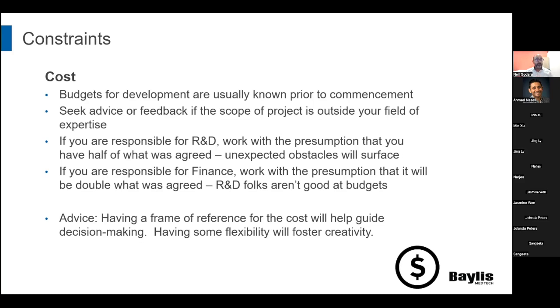Like if you're going to get a lot of bespoke components and everything's got a 12-month lead time, and you have to serialize it for some reason, well, you're never going to get it done. And you're going to have to go back to the team and say, you need to figure out a different way to solve this problem because we have this constraint in the field that needs to be accounted for, and we just can't eat that 8-9 month delay in the project. So you're right, and when I say R&D, you could really think of it like a project management function, in the way I'm presenting it here, and all departments should be considered.